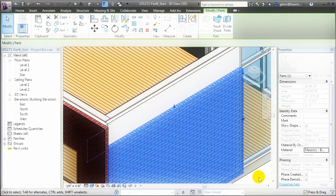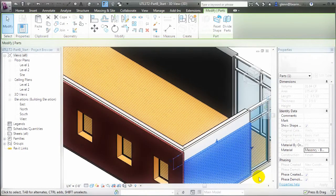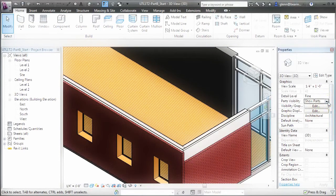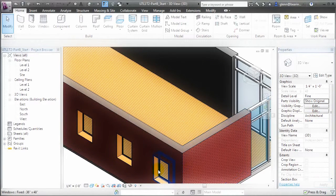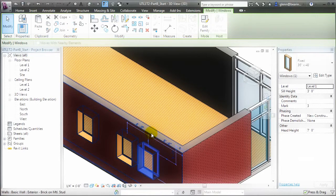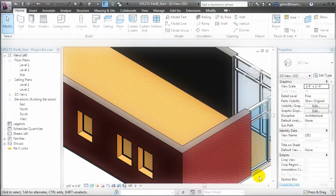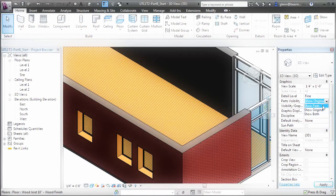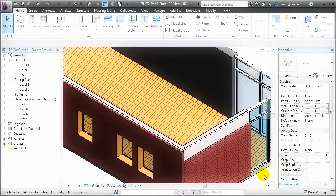One particularly nice feature of parts is that if we edit the original element, the parts will automatically adopt the changes we make to the original. To see that, let me switch back to showing the originals in this view and make a change to these windows — instead of having them separated by 7 feet, let's make it only 4 feet. When I go back to showing the parts, you'll see that the parts representing the layers of the wall have automatically been updated to reflect the new window location. So there's no disadvantage as a designer to working with parts, but for construction modeling we get the advantage of being able to work with the parts independently to more accurately model the true construction sequence.